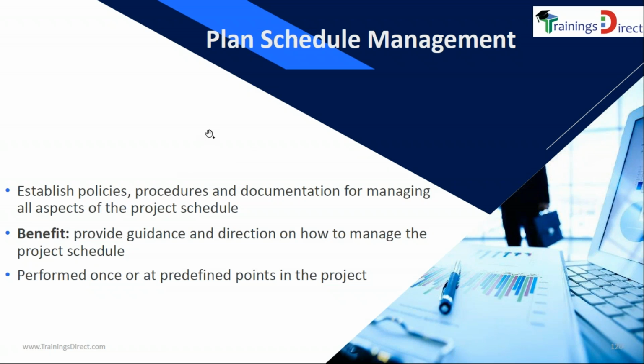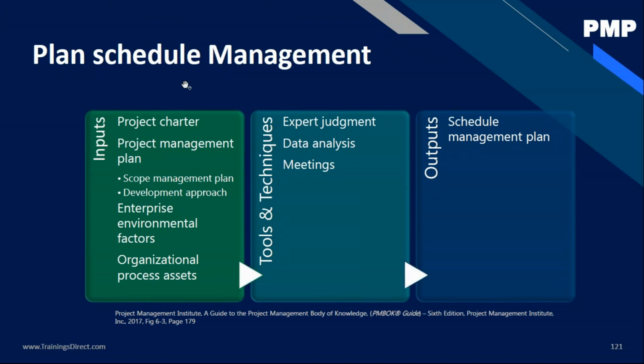It's mainly about understanding how the scheduling should be done, what kind of tools are required, what methodologies will be used, and how the schedule will be documented, how the schedule will be revised, how the changes to schedule will be managed, what kind of tolerances will be applied on schedule activities. Are we allowing 10% delay, 20% delay, 2% delay? If there is significant delay, do we need approval from someone senior, from the sponsor or someone? Those are the kind of policies which can come in this schedule management plan.